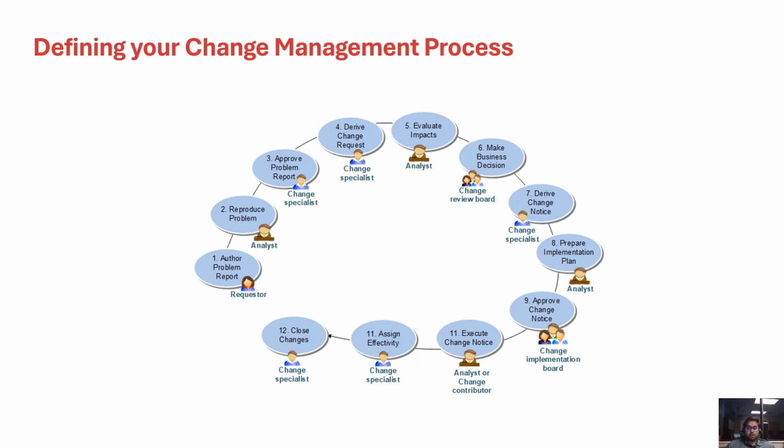Note that at this point no decision has been made, and it has not been decided what new items or item revisions are required to address this problem. After this, the analyst identifies the items impacted by this change and then prepares the supporting document and a high-level proposal for the action required to implement this change.